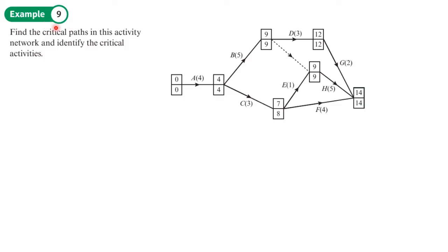Example nine: find the critical paths in this activity network and identify the critical activities. So the first thing that we need to do is to highlight where we see the same numbers for the early event time and the late event time. Then we want to see where the differences between those values is the same.